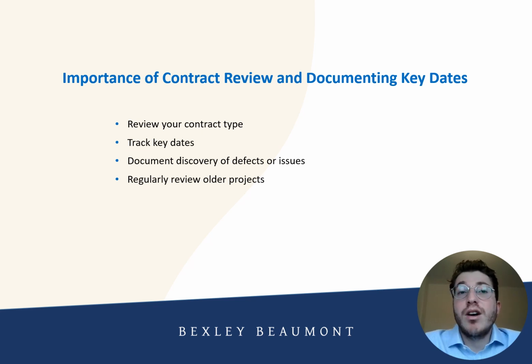When there are defects or other issues, make sure you're retaining documents that show when you discovered it. If you discover a defect after project completion, document when it was found and then consider seeking advice. This can be especially helpful if you may rely on the discovery rule to bring a claim that I mentioned earlier. Also, my advice is that you regularly review older projects.